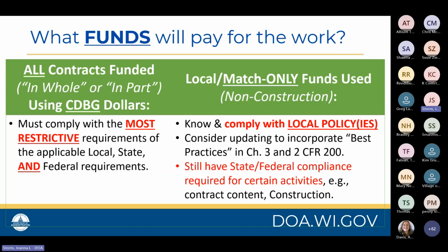So the third aspect here, determining what funds will pay for the work. Again, if you're using CDBG dollars, even if it's just $1, it's still CDBG dollars. So whether the contracts are funded in whole or in part, you must comply with the most restrictive requirements of all applicable local, state, and federal requirements.